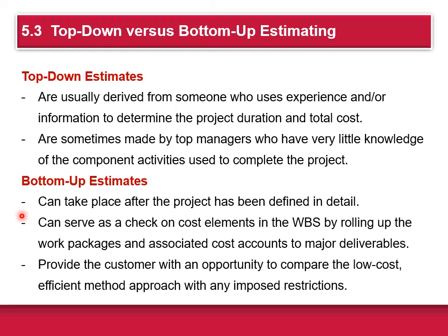Bottom-up estimates can take place after the project has been defined in detail. They can serve as a check on cost elements in the work package schedule by rolling up the work packages and associated cost accounts to major deliverables. They provide the customer with an opportunity to compare the low-cost, efficient method approach with any imposed restrictions. Now, a lot of times these two methods are actually combined.